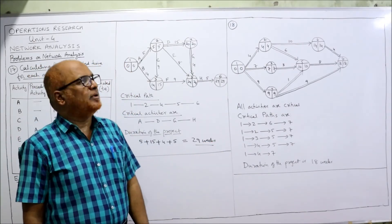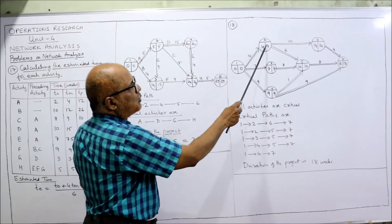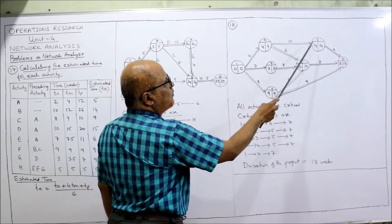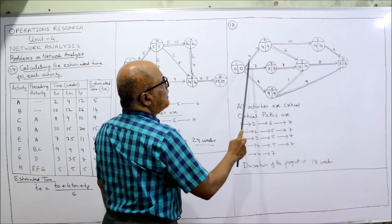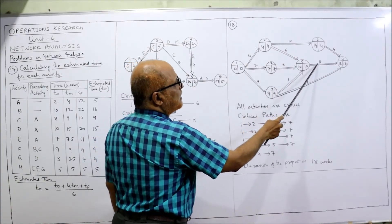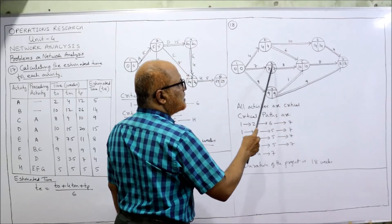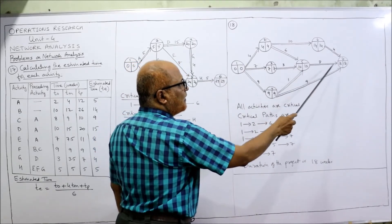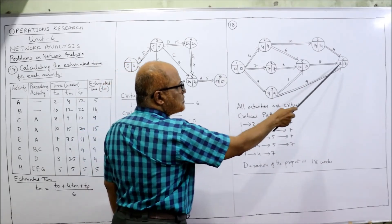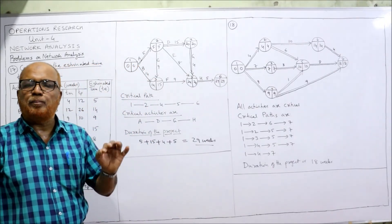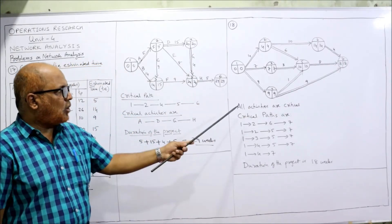The peculiar point in this problem is that all EST and LFT values are equal at every node, meaning all paths are critical. Going 1→2→6→7: 4 + 10 + 4 = 18. Going 1→2→5→7: 4 + 6 + 8 = 18. Going 1→3→5→7: 7 + 3 + 8 = 18. Going 1→4→5→7: 9 + 1 + 8 = 18. Going 1→4→7: 9 + 9 = 18. All paths sum to 18 — this is the first problem where all paths are critical.